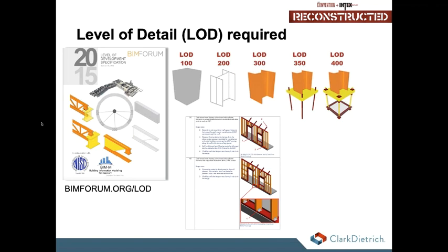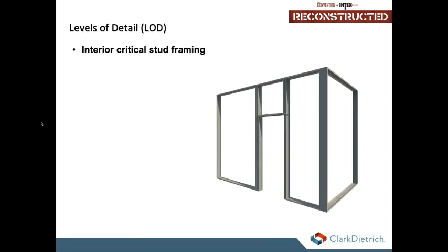So we offer a simple system, which is basically just adding critical studs, critical stud framing being jamb posts and corner posts typically. Anything that hits that, we'll look through collaboration and make sure that there are no clashes on those members only.